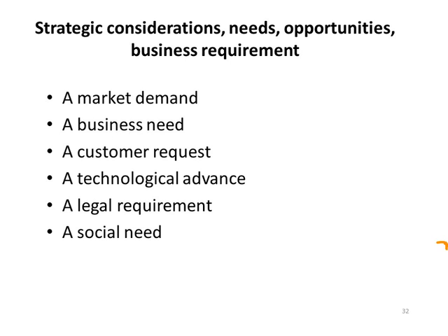What are the needs which create project? Maybe market demand, a business need, a customer request, a technological advance, a legal requirement, a social need. Let's consider examples of each. Market demand. A car manufacturing company may authorize a project to build more fuel-efficient car in response to gasoline shortages.